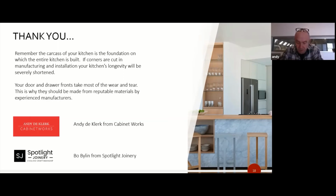The designer will design it, then it gets handed over to the factory. They go to site and check what the designer's done. If there are any discrepancies, they send it back to the designer to change before anything even gets made. In other words, if a plumbing point is 10 mils too far and lands on the edge of a carcass, we'll get them to move it, or we'll change the design. Designs always change, sizes always change, but it should not just be left in the hands of the poor salesperson to take the rap for something in a very dynamic industry.